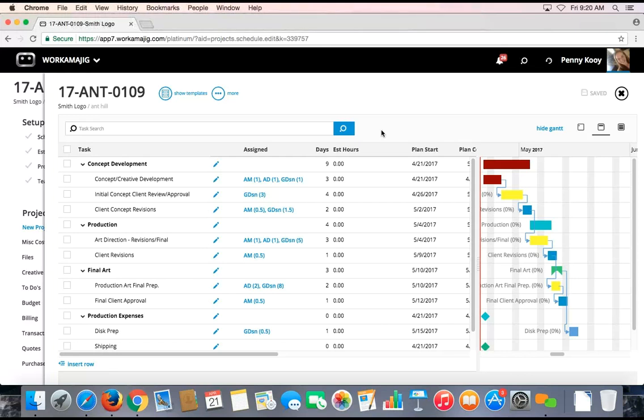So if we're planning on having the offices closed for Memorial Day or Independence Day or any of the other variable holidays throughout the year, we'd want to make sure that we put those on the company calendar well in advance so that all of our projects will also recognize those as non-working days and naturally skip over those for our project planning purposes, ensuring that we're not going to accidentally plan for tasks or projects to be due on days we're not actually planning on working.